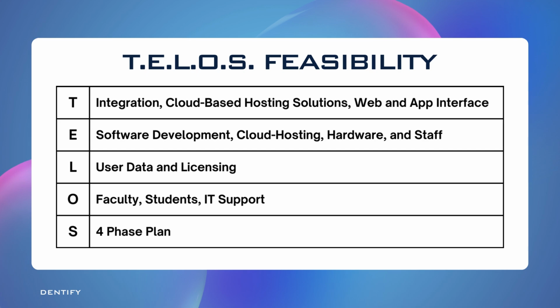The project's economic feasibility requires 3 million pesos for software development, 40,000 pesos per month for cloud server hosting, 120,000 pesos for hardware, 25,000 pesos for each faculty training workshop, and IT maintenance staff at 75,000 pesos per month. To manage expenses, phased implementation, university sponsorships, and potential external leasing of Dentify to other Simodont users are viable options.